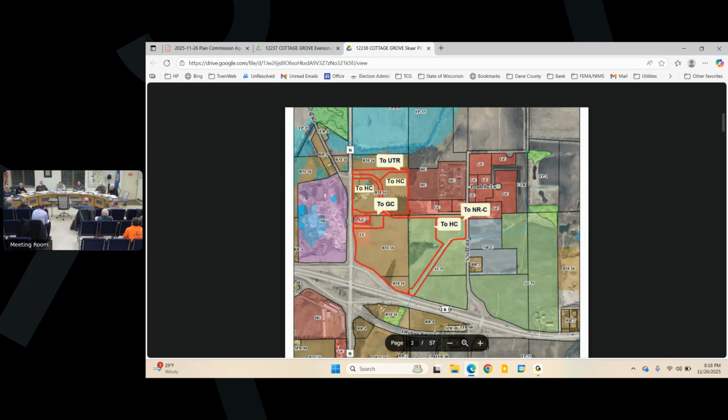But yeah, you all absolutely can do that kind of charge back, that assessment idea when and if you guys do have to go into basins to maintain them. But this is a classic example where you want to have it, because you're going to have a new town road that'll drain to that. And you're going to have 6 or 7 lots that'll drain to that, all with different owners. And so to have a responsible party being the town to take care of it makes sense in this setting. But just be clear, they'll build it. It'll be inspected by the town engineer, and then it'll be turned over to the town.